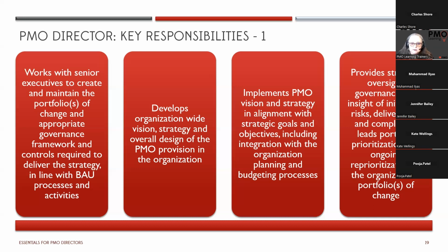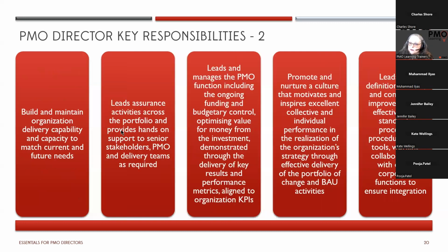Now, an important point to mention is that we don't see the PMO director, or in fact anybody in the PMO, as being the key decision makers on projects and programs. We are a support function to the business. We will provide them with the information and we can provide advice and guidance to project and program managers, but we recognize that key decisions on projects are made by sponsors, and key decisions on portfolio are made by the executive team. So we present that information, talk it through and provide advice and guidance, but make sure those decisions are made by the senior team of the organization.